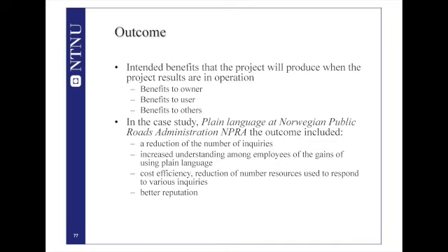If you are able to save 1 million hours of resources that you have used on various inquiries, and reuse these resources on another type of tasks in your organization, then you have really achieved your purpose.